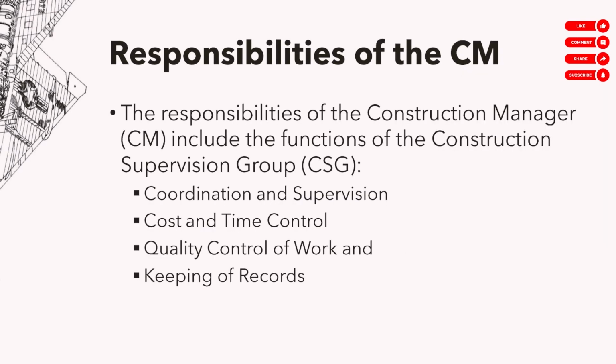Okay. Ano ba trabaho ng CM? Okay, the responsibilities of the CM include the responsibilities of the CSG. So, kung ano yung sinabi natin trabaho ng inspector kanina, pasok yun sa trabaho ng CM. Okay? Including the following: coordination and supervision, cost and time control, quality control of the work, and record keeping. The one thing that's really important here na medyo bago, na hindi part ng full-time supervision kanina, is ito. Meron ng cost control, meron ng scheduling, na hindi masyadong focus ng full-time supervisor. Yung full-time supervisor is mostly just simple supervision, right?